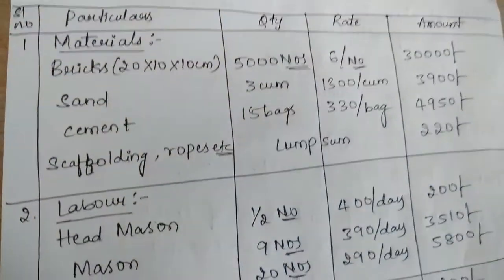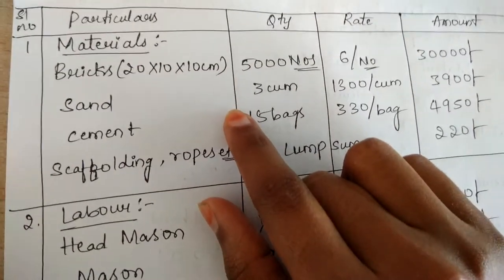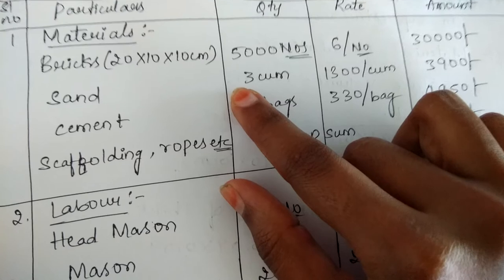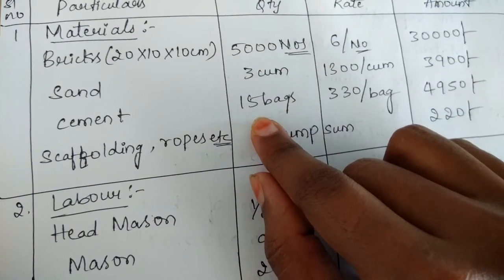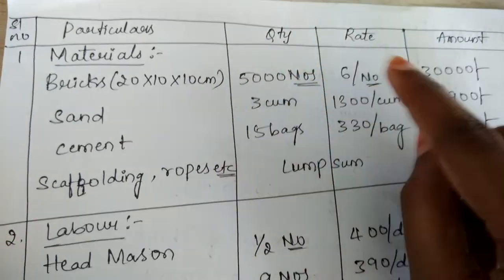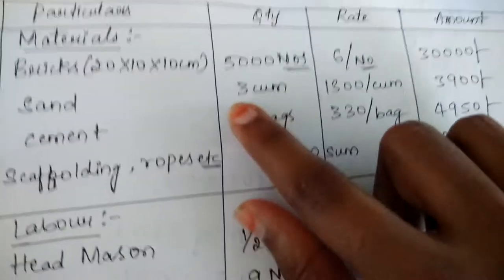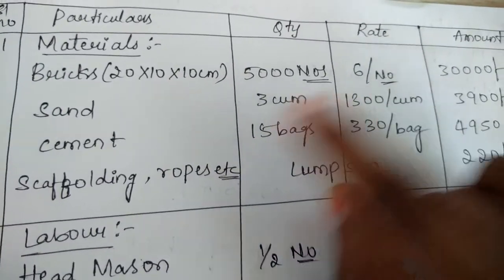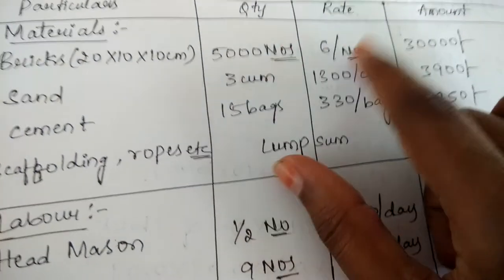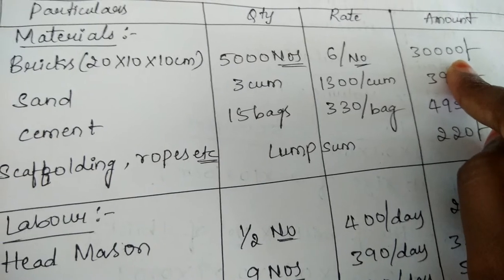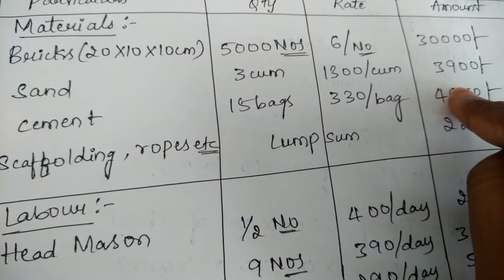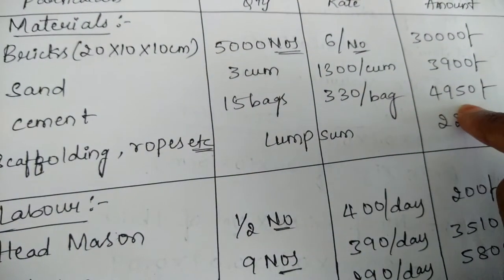The quantities found earlier are: 5000 number of bricks, 3 cubic meter of sand, and 15 bags of cement. The rates for those materials are: bricks at 6 rupees per number, sand at 1300 rupees per cubic meter, cement at 330 rupees per bag. On multiplying quantity with rate: 5000×6 gives 30,000; 3×1300 gives 3,900; 15×330 gives 4,950 rupees.